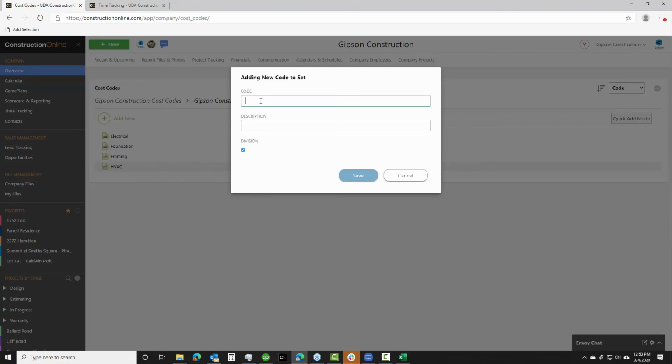Now, in my experience, it's a lot easier for field teams to clock into straightforward cost code lists or cost code sets. I was actually speaking with a few of our clients at the International Builder Show a couple of weeks ago, and they'd set up a really effective system where they had a few different cost books for different project types that they worked on, but there were only maybe 10, 15-ish cost codes per cost book.